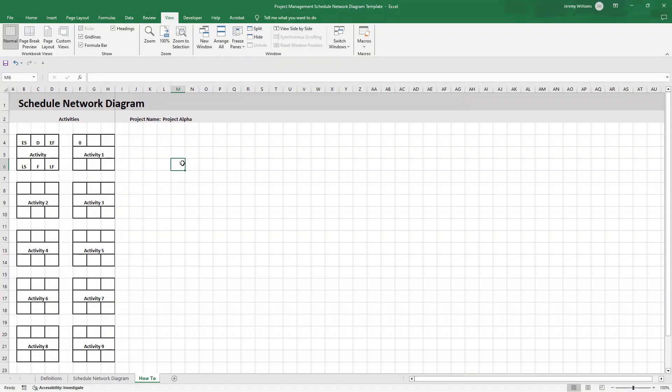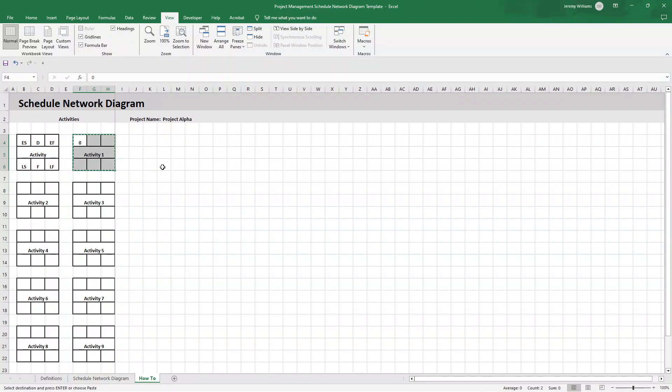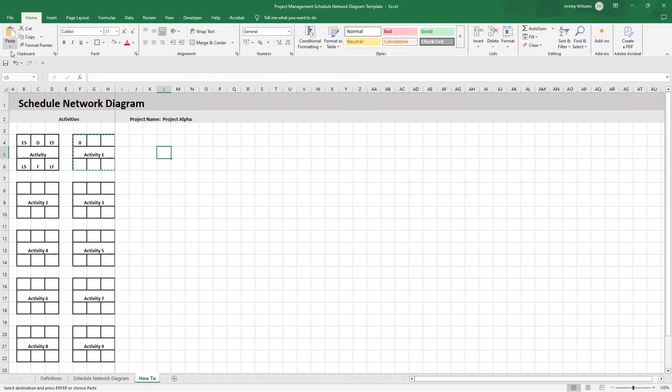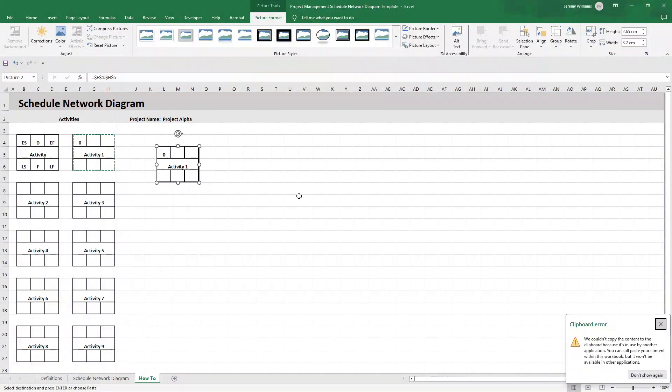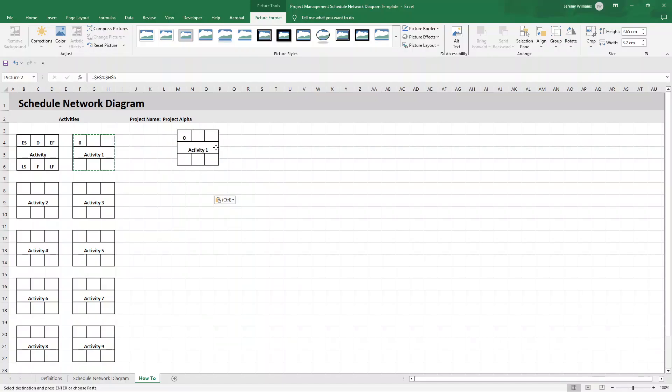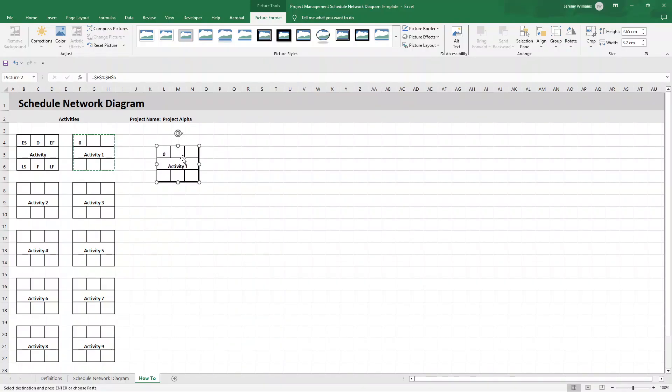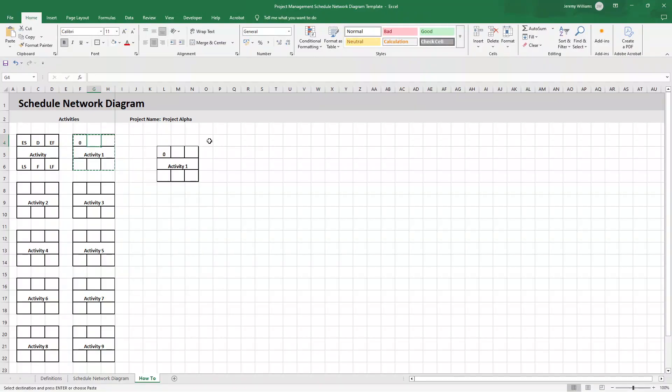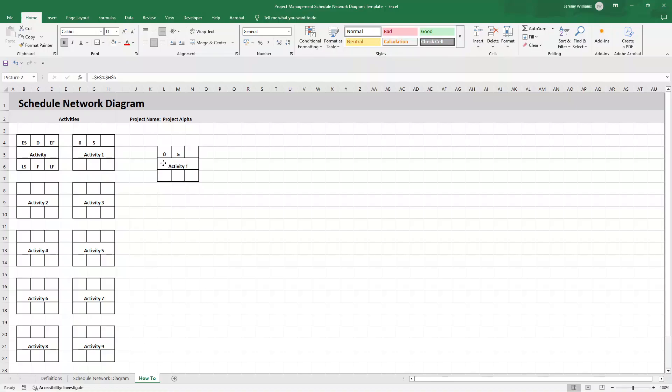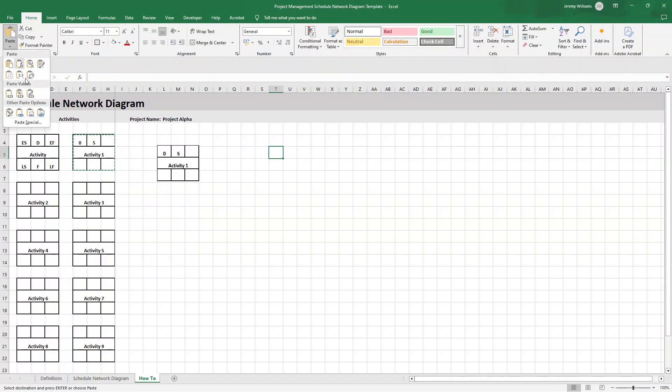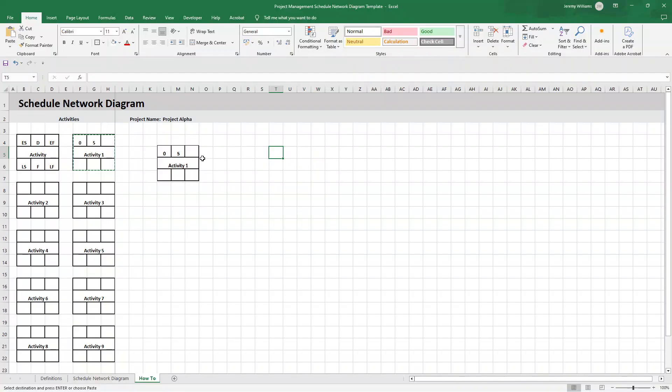Now, what we're going to do to create the diagram is we're going to select the various activities, but this is the little trick. So let me select from F4 through to H6, control C. And then what I'm going to do is I'm going to go, we'll click here for now, L5. I'm going to click home, paste, and we're going to click on linked picture. Now, the reason why we do this is there's multiple reasons. So firstly, we can kind of drag it around, which makes the creation process really easy. But it's linked so that when it comes to updating this network diagram, it's effortless because you just have to type it in here. So let's just say the duration was five days. It's going to come across. And if we set this up using these kind of content areas and linked pictures, it's very, very easy to update depending on the project. So that's why I'd recommend doing it this way. You don't necessarily have to. You could just copy and paste this as just a regular picture or even just as values. But as I say, the linked picture does work particularly well.